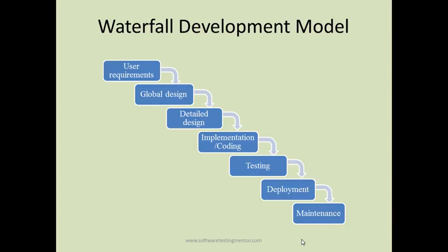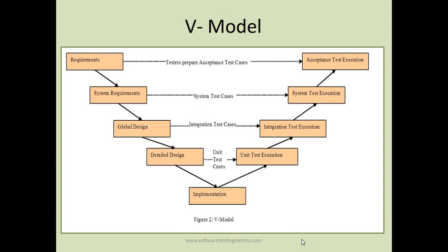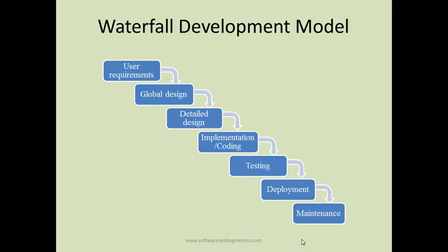So to overcome the issues in the waterfall development model, another model came in, known as the V development model. In the V development model, testers were involved right from the beginning. In the waterfall development model, testing came after 4 phases were done. So what if there were issues in the requirements? What if requirements were not captured properly and are not testable? Testers never knew if the requirements were not even valid, or if the design was not proper.